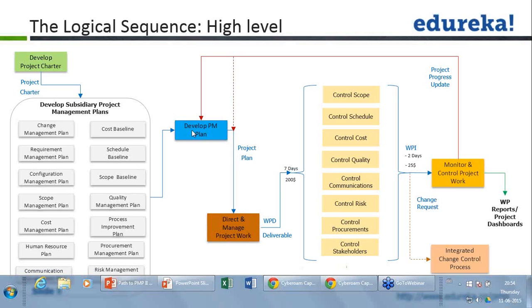So you have planned for a sprint, or you have planned for an iteration. You identified some of the deliverables and the entire team is working on that. Once that part is done, it will be taken to a forum, or it will be reviewed by all the stakeholders, where they will provide input and feedback, and that feedback will be incorporated into the work that you need to do in the next iteration or next sprint.